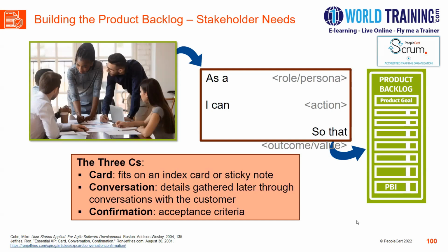So the product owner, as we call, is accountable for an effective product backlog management, but certainly it does not mean that only he will populate the product backlog. So in building the product backlog, product owners should keep the following things in mind. He should collaborate with appropriate individuals. He should capture just enough information to understand the needs. Details will come later, but he should document enough items for the teams to start the first sprint.